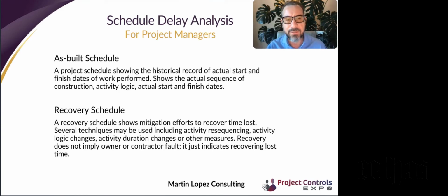There are also recovery schedules that are typically performed during the project execution. These recovery schedules are not acceleration schedules and are not typically contentious. These are typically schedules that are prepared to recover lost time without claiming or blaming any of the parties in the project.